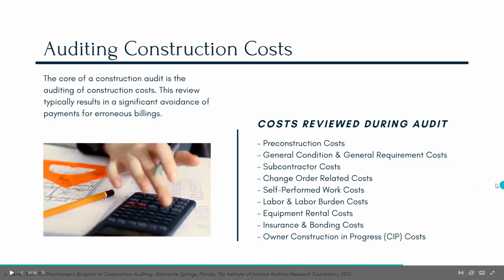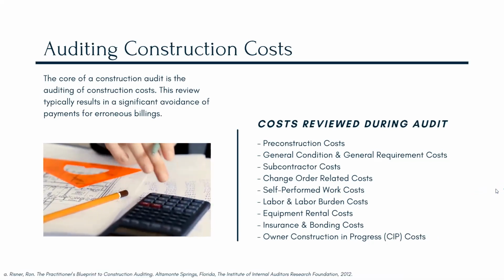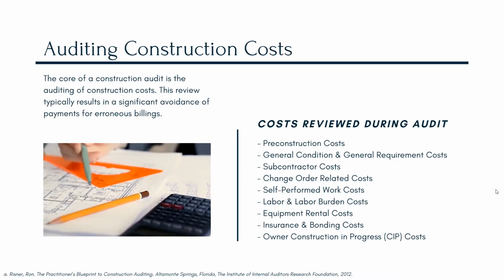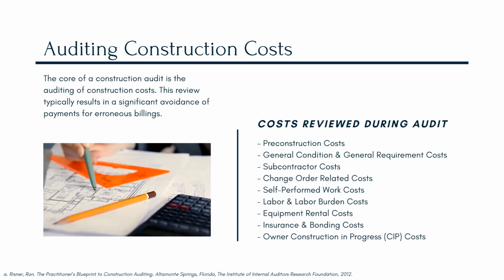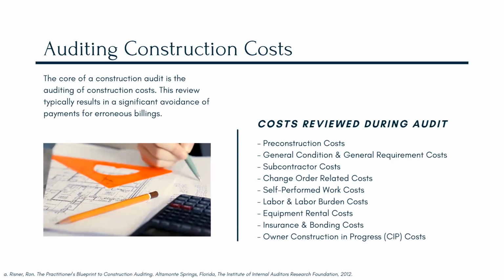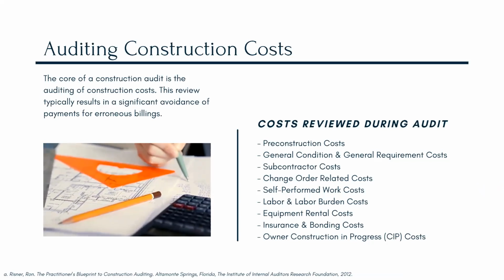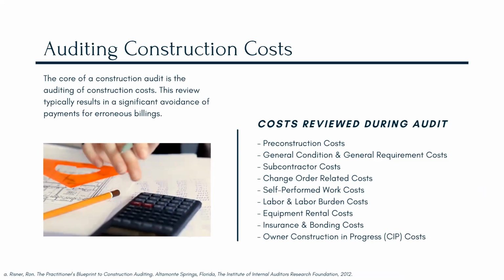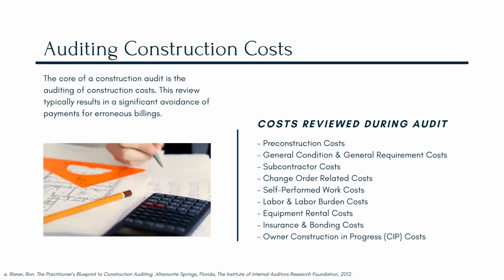If it's a prepay environment, as change orders get submitted by the general contractor, we review those in real time, review the basis of those, and then as needed, determine the quality of work being submitted, and make sure that it's in line with the specifications for the project.